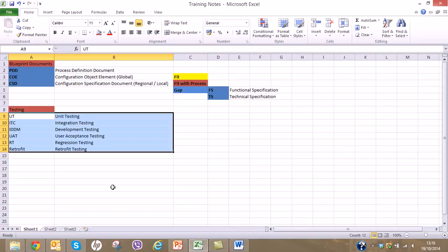I'm just confused about that. Unit testing is, for example, if the FI module you have configured, you will only do unit testing, only FI. But if there is something related to another module and the process goes into FI, so this is integration testing, because two modules communicate with each other.